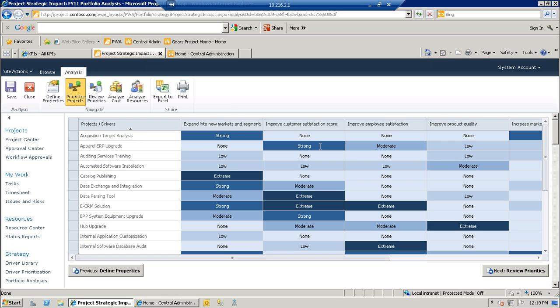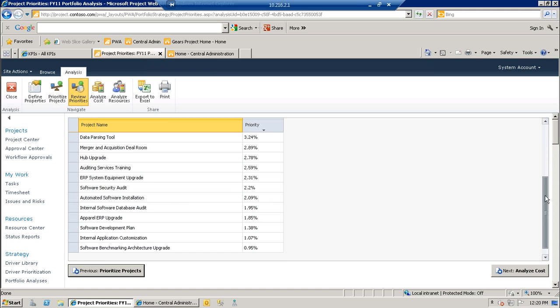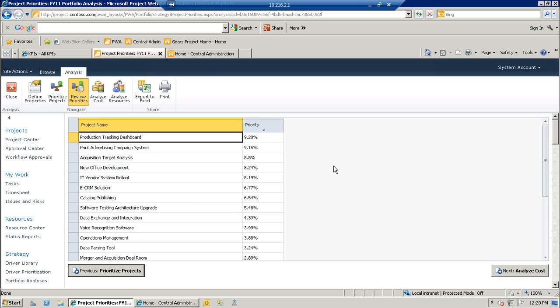So you can see how each project is scored based on each of those business drivers. There's a mathematical algorithm that then goes to work, and the outcome is this stack ranking. The project production tracking dashboard is the top ranked project in this example. I can scroll down, you can see every project. Basically, the percentages are the percent of the total business value that you're looking at for the organization. So this view tells you what percentage is applied to each project.